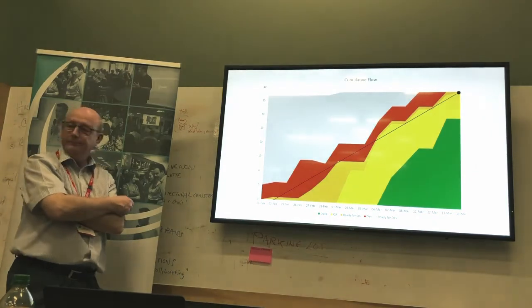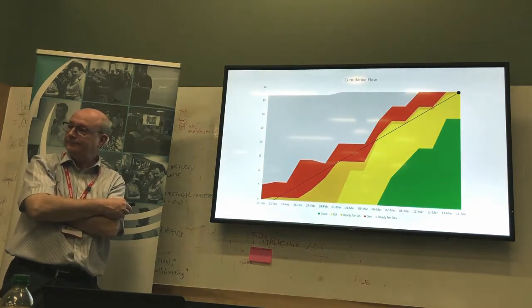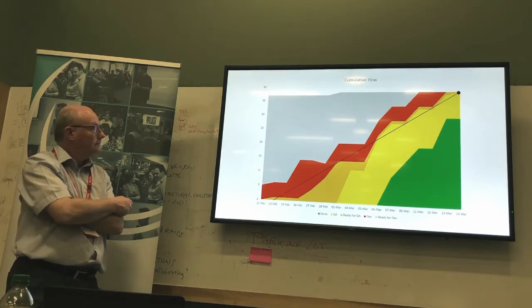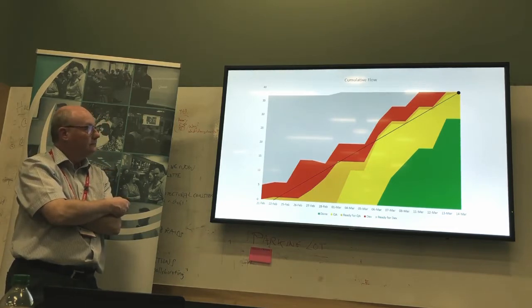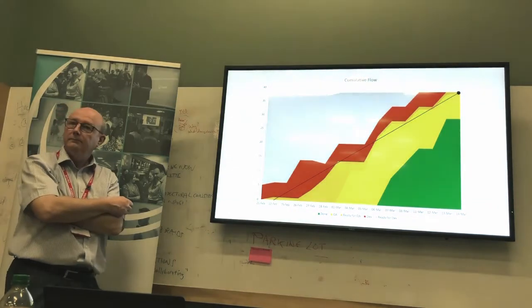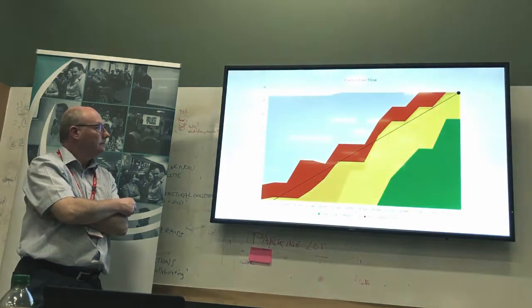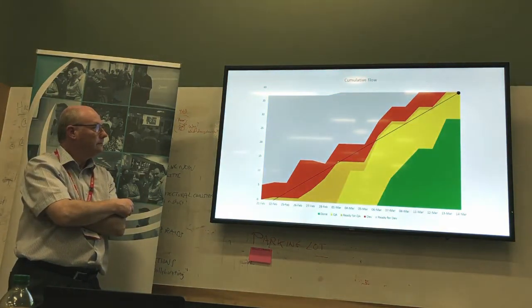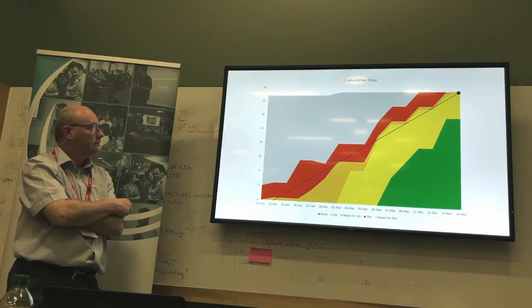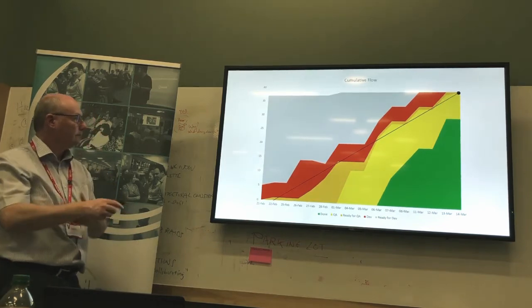So I suppose one of the key signs here is always the fact that once they do start going, there is a steady rate of green. It's not like it's just solid yellow, which would indicate they've just been very slow or struggled at it. I think the thing with CFDs is the most important thing is the work in progress. If you look at red and look at green, how big that is, with regards to Little's law, there's going to be your high cycle time.